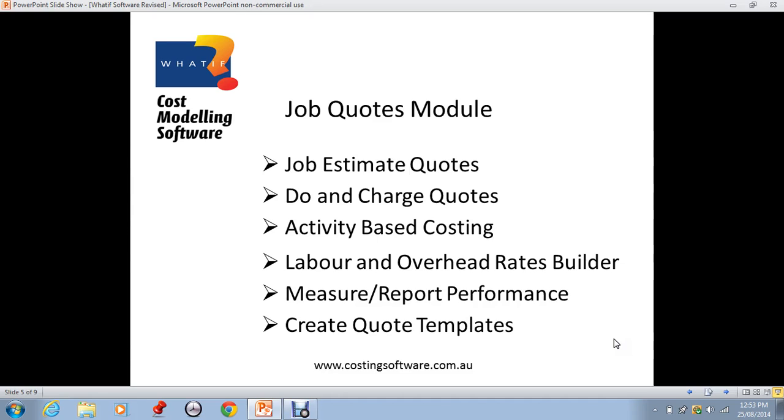Materials from the costing module are added to the bill of materials for each job task. These materials can also be reconfigured in terms of dimensions required for the task. Labour costs for each task are entered by work centre by operation with estimated times expressed in standard hours plus manning and a percent efficiency, and costed at standard work centre labour and overhead rates. Subcontract and other sundry costs are entered by operation by supplier.